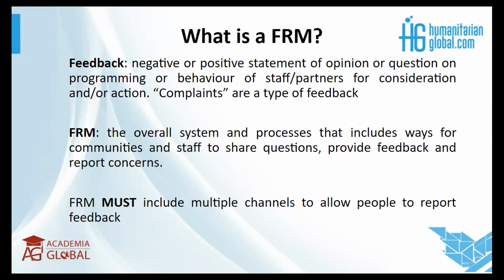For example, if the complaint is about a staff member where something went wrong in the project, and this is of course a subjective opinion of a community member, we can deal with the issue internally in the organization and have some disciplinary actions. Then we close the loop by going back to the community member, if we can identify the person, or make it known that we have already done our disciplinary measures. There's no need sometimes to go into the complete details. If the person no longer works with you, of course, this should be explicitly said. But if you have a whole internal disciplinary process, this can just be communicated in summary.